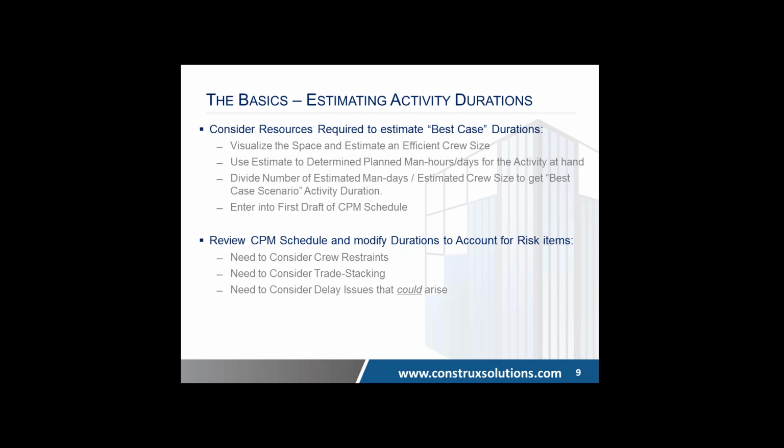Other risk items that exist are upfront changes, upfront RFIs, incompleteness of drawings, and weather in the winter. Where are we located? If we're in Toronto, does it get freezing cold, and do we think it's going to have an impact on some of our durations with concrete and that sort of stuff? Things that you need to think about. The more best case durations in your schedule, the higher the risk of budget overruns and delays. This is just what I've seen in experience. People who start to say that we can get a project done in 4 months, and the activities that lead up into that are very much best case durations.